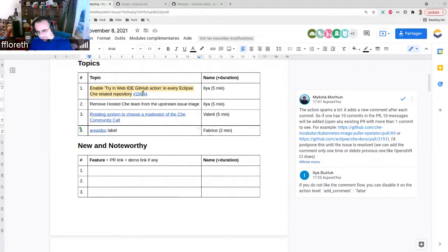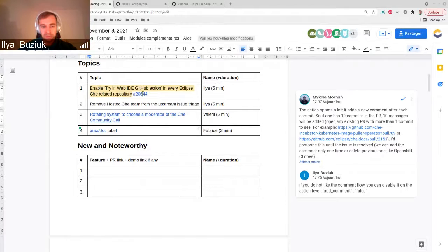And just a comment about the controller team. Starting from the next sprint, actually this Wednesday, we're going to post the stand-ups, because there are also 8 people in the controller team, 6 devs and 2 QEs. So we are having very time-boxed stand-ups. We are doing the actual stand-ups with comments in chat mode.